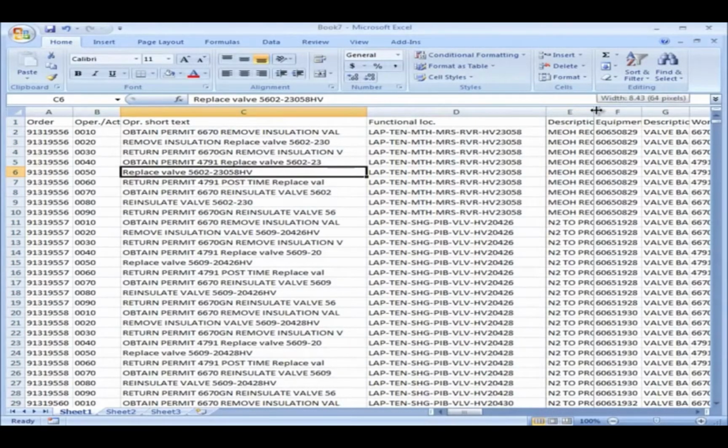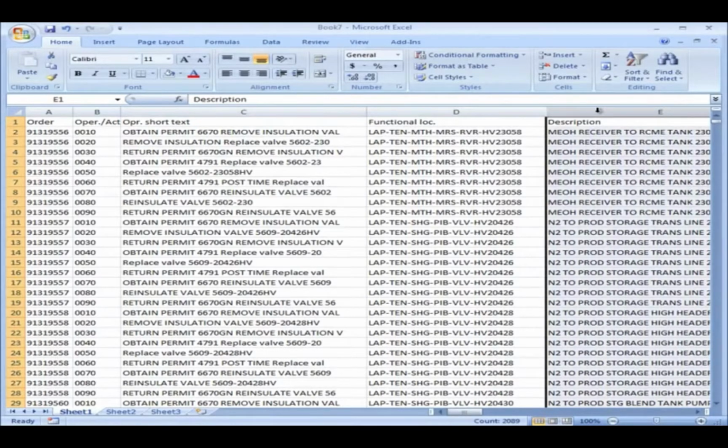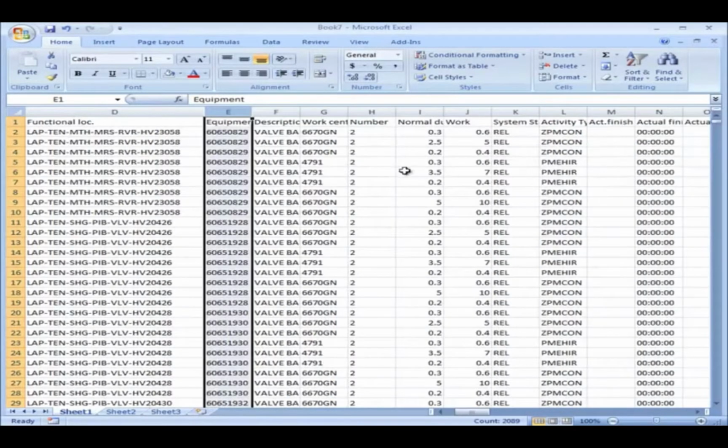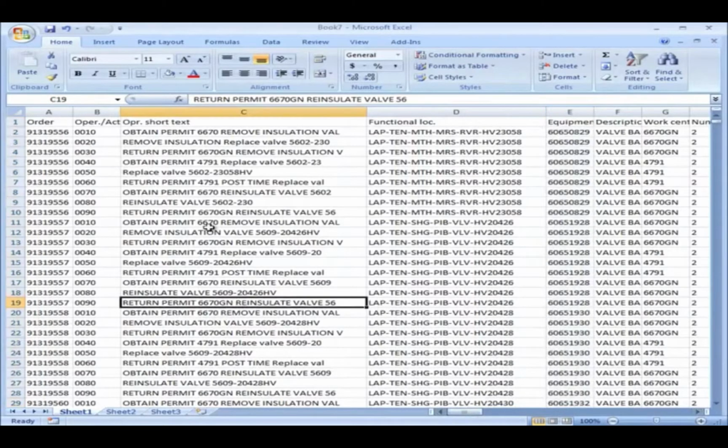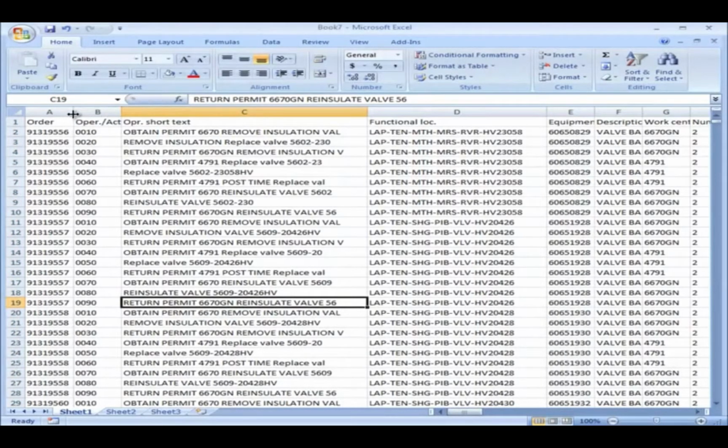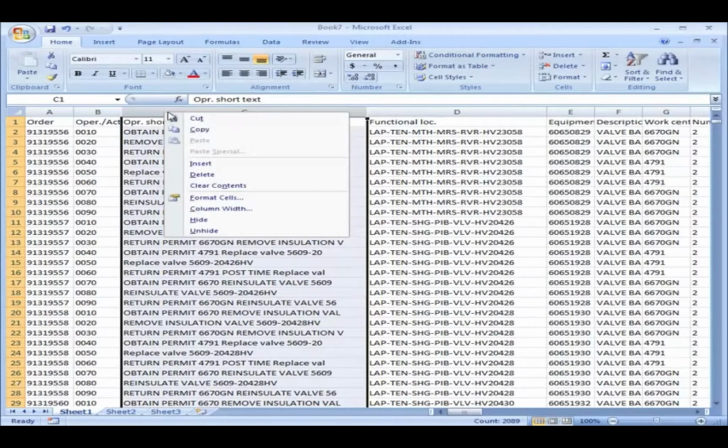And some of the, like the functional location, if I already put the functional location as an activity code, I do not need the description. All I need is the functional location value, that code value that goes in. The description will already be there, just like we did with the cost account.